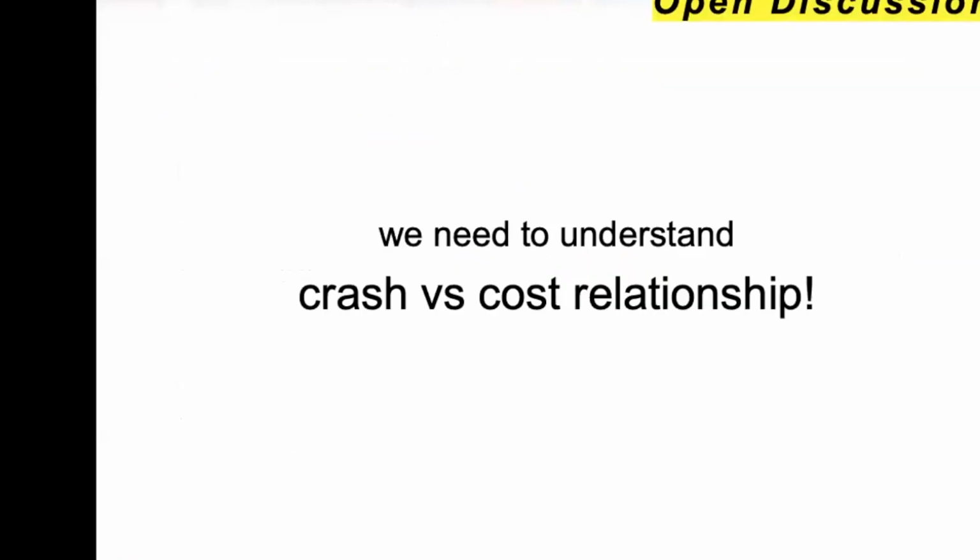What do I mean here? It makes sense. If you put in more money, I guess, you can complete it earlier. You can probably shorten the activity, right? You can just hire another designer on the spot, like a contractor for a week, and then they can work together, and then you can compress the work, right? So that's the cost and crashing relationship.